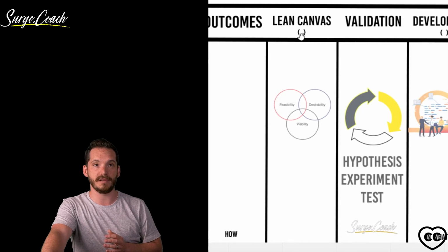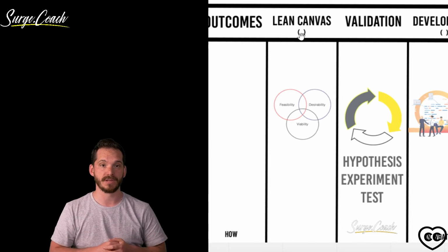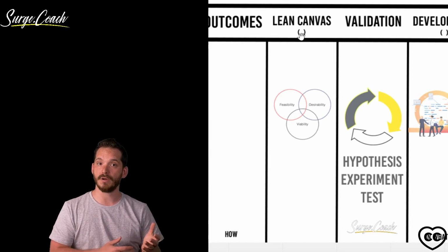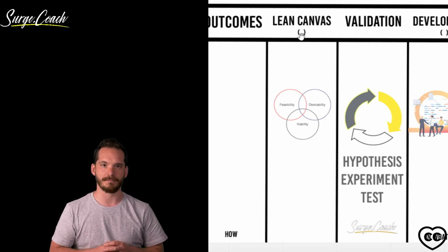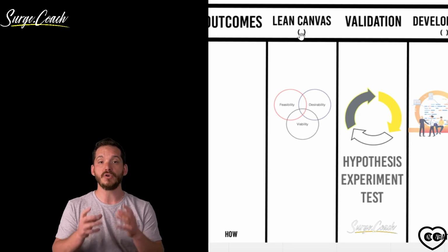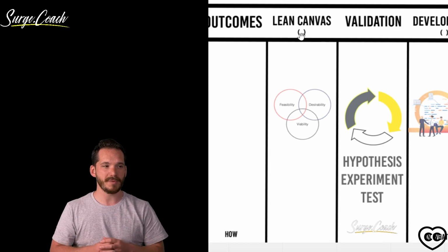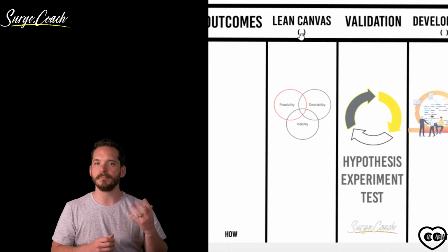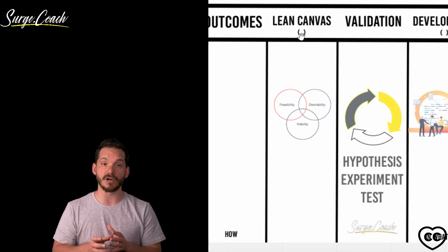As you can see at the top here, there is a work in progress limit. This is dependent on your organization and what level you're using this at. If this was used at a program level, I'd recommend 1. You're looking at 1 lean canvas at any one time, because you're only looking at the highest priority item. If you're looking at this from a strategic point of view at an organizational level, you may have 6 or 7 purely based on how many departments can work on a lean canvas at any one time. This depends on the structure of your organization.